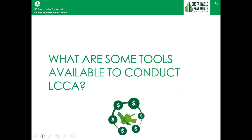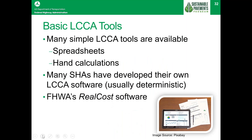Now I'd like to go over some of the tools available to conduct life cycle cost analysis. Basic LCCA calculations are simple and can be done by hand or using a spreadsheet. Many agencies and consultants have developed their own software that reflects locally agreed-upon inputs and policies to ensure uniform application incorporating local unit cost, discount rate, and maintenance cycle. FHWA's RealCost program is available for LCCA computations, including probabilistic analysis.